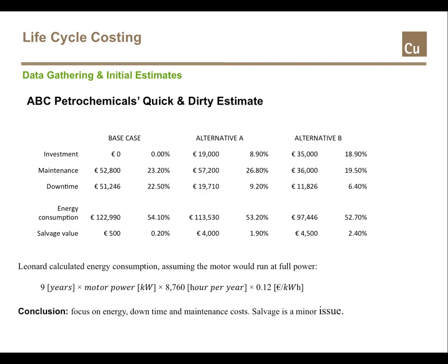Before you start gathering actual cost data, it's always helpful to derive a quick and dirty LCC estimate. This will give you an initial idea of how the different cost components relate to each other. For a quick estimate, it's not even necessary to take the time value of money or inflation into account. You simply multiply the annual expenses by the number of years in the time horizon and add them to the initial investment cost with any other one-off expenses.